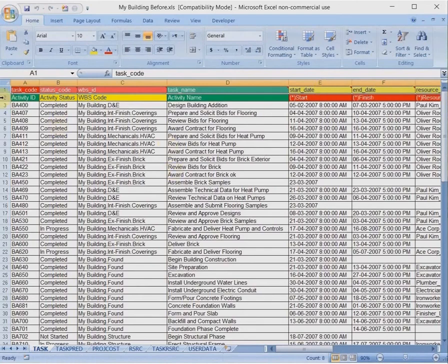The second line is also characterized by three colors: green, yellow and red. Green indicates that this column can be updated with any value, whether this value is numerical, text or date, depending on the column whose data is updated. Yellow indicates that this column can be updated, but the update value must already be present in the database to which the file will be re-exported, or present in the data of the project being updated. Red indicates that this column cannot be updated.